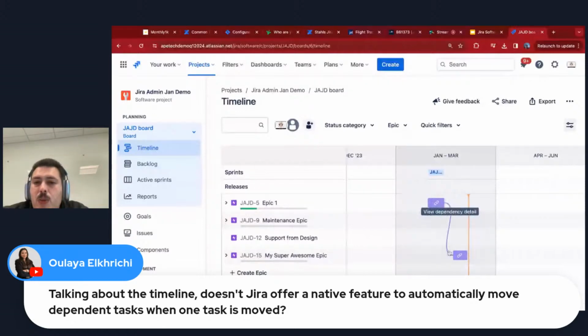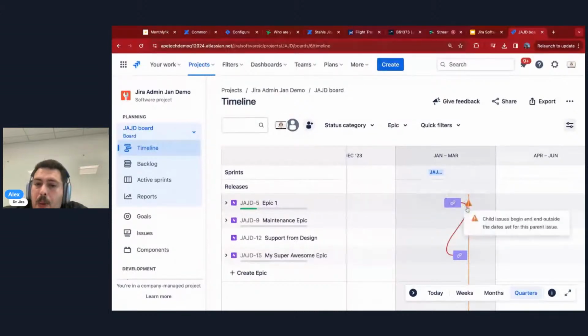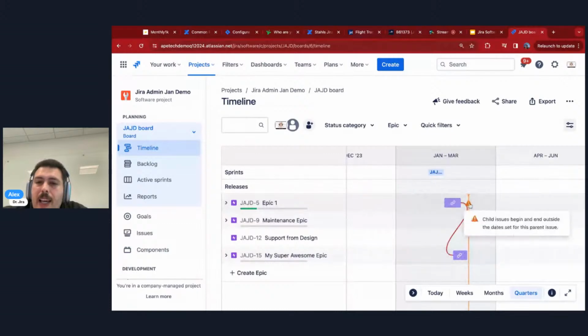And if something starts getting delayed, like this one got delayed 15 days, you can see the plus 15 there on the right side. And if I let go, you'll notice that my line is now red. So it won't auto push. It will not push this out 15 days, but it will give you a warning and a red line. It just doesn't auto push.